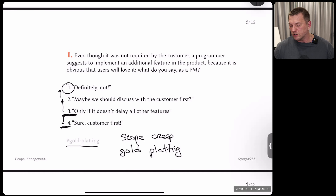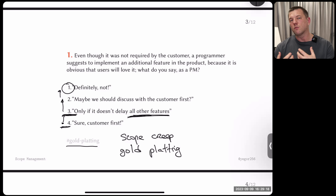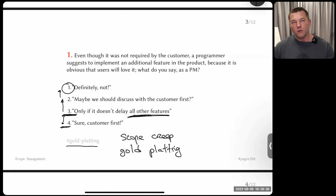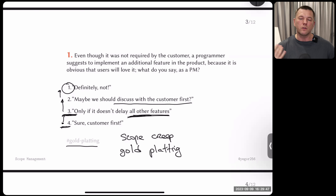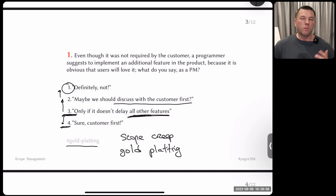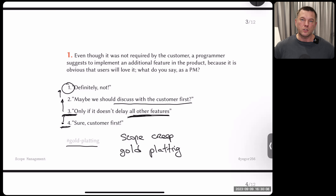At least first check: if it doesn't delay all other features, then maybe we care about the extra feature. But we shouldn't play the role of a user — the user has their own representative in the project, maybe the customer or someone else. Programmers are not a good source of this information. The programmer may suggest an idea — we write it down and go to the customer to ask. We shouldn't throw the idea away, but we definitely should not allow the programmer to start working on it.